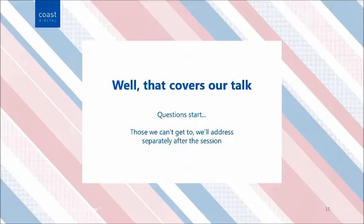And just put simply, in the literally 30 seconds we've got left, if your stakeholders, and you will know them better than us, are people who are comfortable in not knowing exactly what the outcome of their project will be in terms of functionality, then they might be stakeholders that would prefer an agile approach. If your stakeholders are very keen to know exactly what they're going to be receiving, then obviously we need to put a lot more time into research, a lot more time into constructing wireframes and things like that, so that you can manage them better. They can understand precisely what's going to come out of the other end.